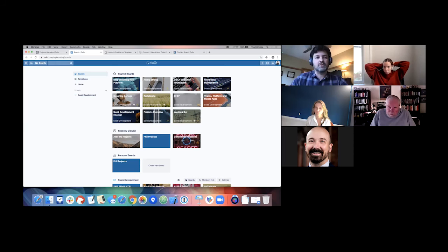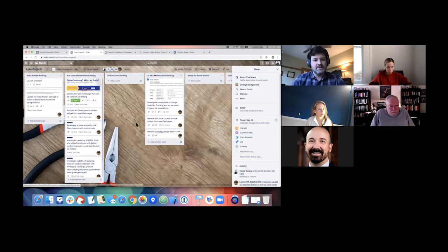when we're doing all of our testing and debugging, to create lists of issues and tweaks and things like that that need to be changed. And having a board for every project just means that those issues end up scattered in all these far-flung corners, and it's harder for our development team to find those issues and understand what's the priority and things like that. So what we've done is we've actually switched much more to a process where we have a board for each developer, and on their board they have their cards across a variety of projects, right?